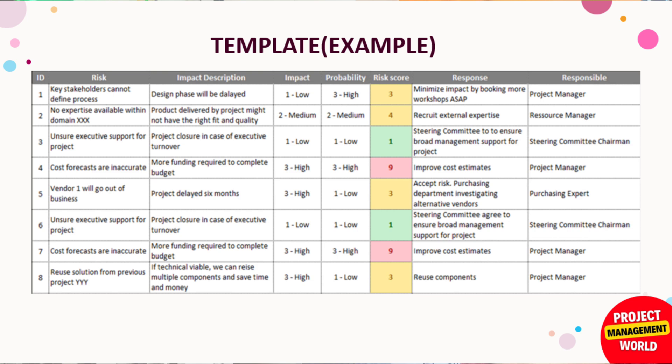Next we come to the qualitative risk analysis columns: impact, probability, and risk score. Based on expert judgment, we assign impact and probability ratings for each risk — for example, one is low, three is high. Multiplying probability by impact gives us the risk score. Then we have the planned response column, and finally we assign an owner to each risk.